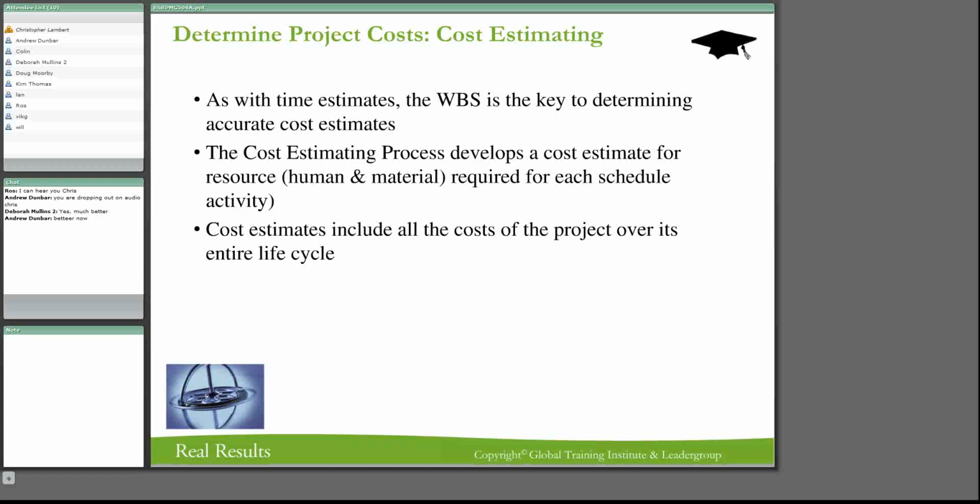But the cost estimates are going to be iterative, aren't they? Because you're not going to know the exact costs when you're doing the first part of the project. In initiating a project, you're not going to know those initial costs. You're going to have a vague way, and your technique of finding that cost might be very broad. But when we get down to the detailed planning, it's going to get much narrower, and we're going to expect a much better costing for that.